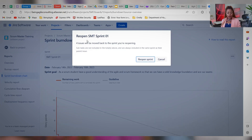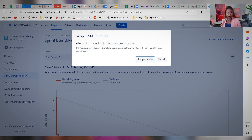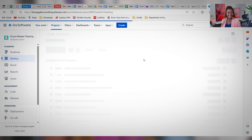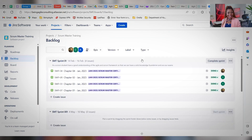Click on Reopen Sprint. It will show you all the details — four issues will be moved back to the sprint you're reopening. Subtasks are not included in the total above and are always included in the same sprint as the parent issues. So click on Reopen Sprint. And ta-da — our sprint has been reopened.